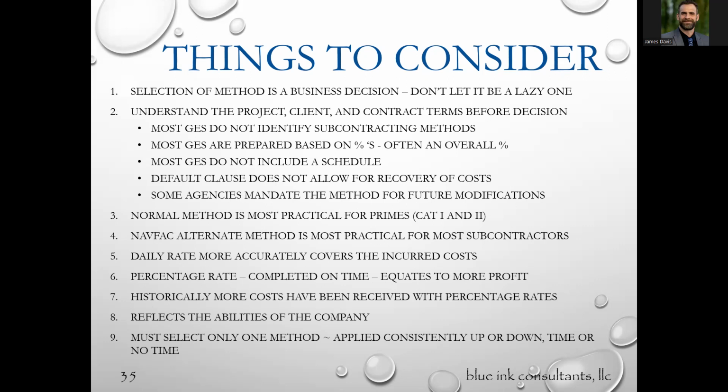I think it should cost $100,000. You've got $200,000, and we're going to sit down and go through it and figure out why. Okay, those are something that we want to also encourage you as you're putting your proposals together. Government estimates, they just think about straight across the board, one person to do it. They might even have an estimating manual or something like that. They don't take into consideration any subcontracting methods or how many other procurement buys you have to do. You also have to remember that every subcontract, every lower tier subcontractor, every lower tier vendor has markups that they're allowed to have. Okay.